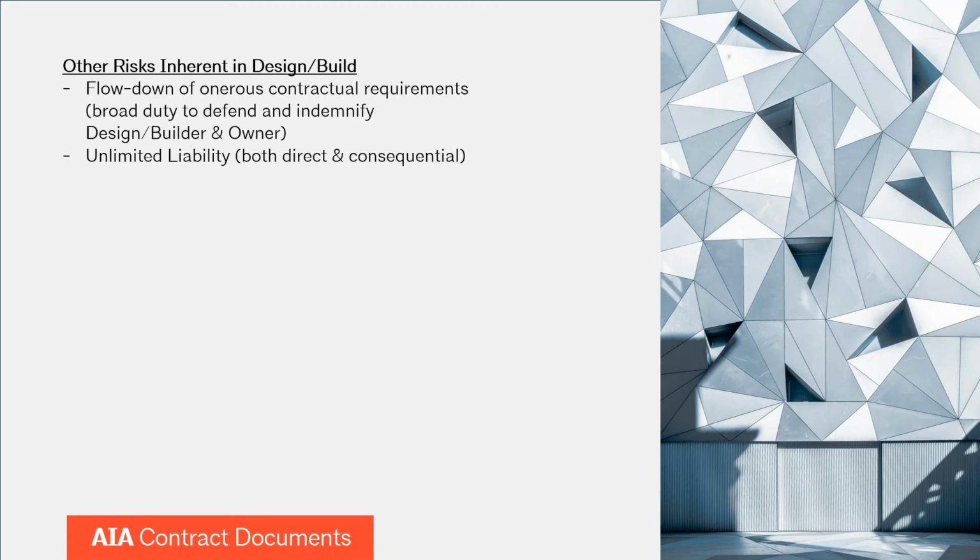What do you usually see in your experience? Yeah, that's a really tough one, and it really is a factor of, as I said before, how much of the design remains to be done, and it's usually quoted as a percentage of construction costs. Oftentimes it's been anywhere from 3 to 4%, but if you're establishing the GMP and schedule on really thin proposal documents, it could be as high as 7 to 8%, maybe higher. So it's really a factor. From HOK's perspective, we start out on our typical progressive design, or depending on where we are on the value-based design, but really no less than 4%.